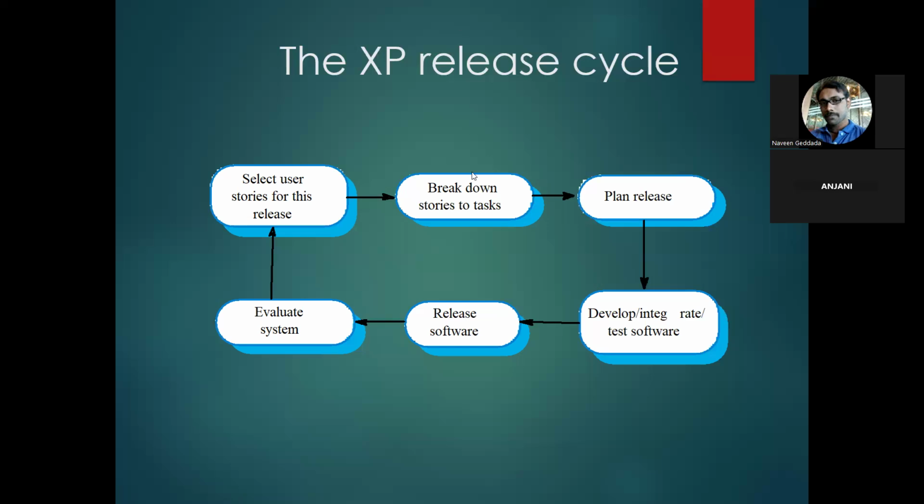So you just need to remember this is the process, similar to whatever framework you have chosen for agile methodology, whether it is Scrum, extreme programming, or whatever it may be. First we will have the product backlog and we will select the user stories from it. And for the user stories, we will split into tasks. For example, in the login screen, you need a UI design, so you will create a task under that user story stating UI design for the login screen, which is assigned to the UI designer.